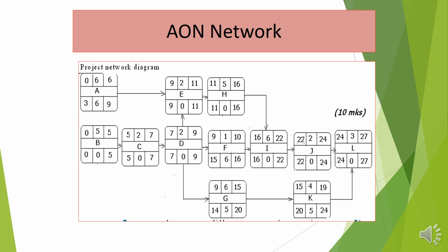In other words, even if you delayed this activity, instead of starting from 15th, it started after 20 weeks, still you'll be in time to supply L. So we can go backwards. Still G, G must be ending at 20 for it to supply K at 20, and so its latest start is 14. Now when you do this throughout, it gets some complication.